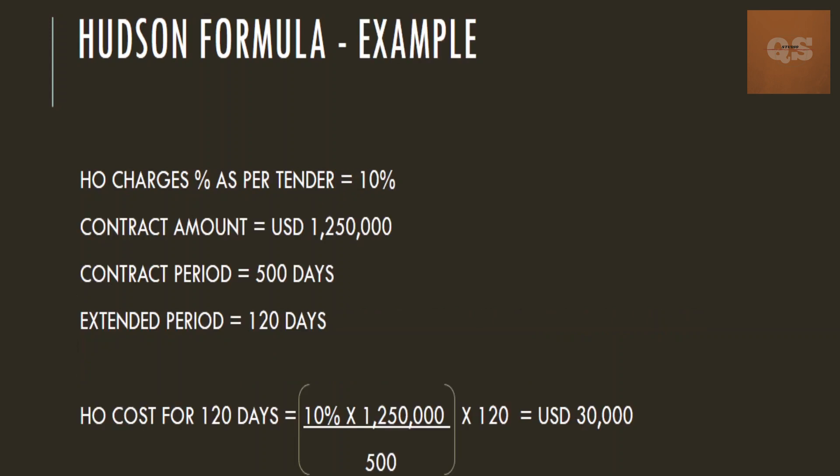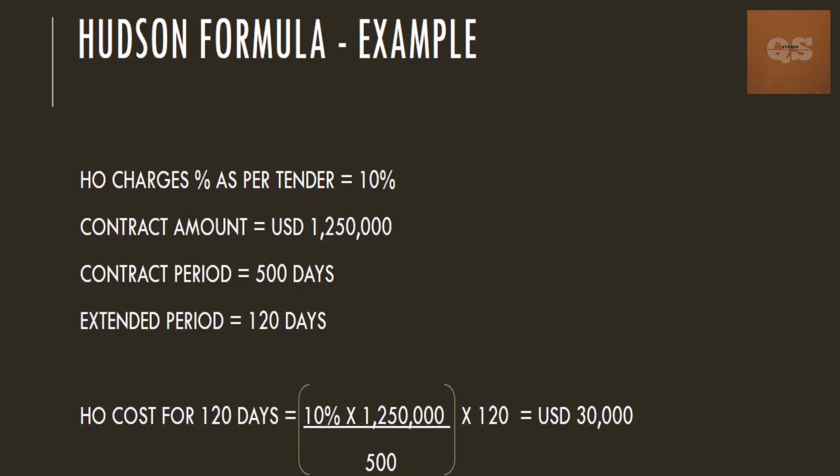The head office charges percentage is given as 10% in your tender document. Your contract amount is 1.25 million US dollars, your contract period is 500 days, and your extension period is 120 days. Using the Hudson formula, the head office cost for 120 days equals 10% multiplied by 1.25 million US dollars, divided by 500 (which gives the head office cost for one day), then multiplied by 120 days. When you calculate, you get approximately US dollars 30,000.